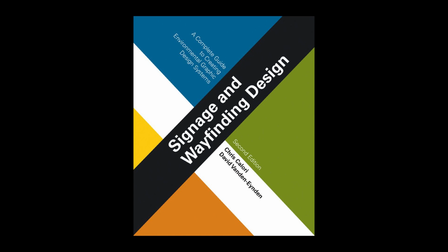Phase 3: Goals and Results. The primary goal of the design development phase is to solidify and refine the conceptual direction selected at the end of Phase 2, and to obtain client input and approval before proceeding into final documentation of the signage project. Phase 3 results in several items that convey the evolution of the informational and visual aspects of the design concept to the client. At the very least, these items include sign location plans in progress, message schedule in progress, drawings showing development of sign graphics, and drawings showing development of sign hardware.